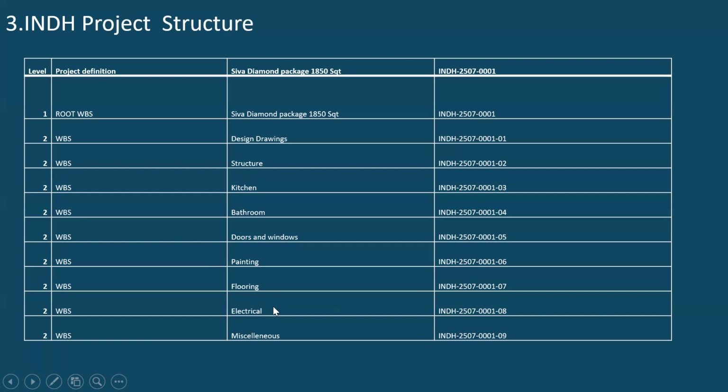I want to take this electrical WBS element as a billing element, and under that, as you said, you can create different level 3 WBS elements, for which you can record electrical cost for ground floor, first floor, second floor, and third floor, and the total will accumulate at the electrical, which is at level 2. That means any cost that is recorded at the child level will roll up to the parent level. Similarly, here also from level 2 to level 1, it will roll up.